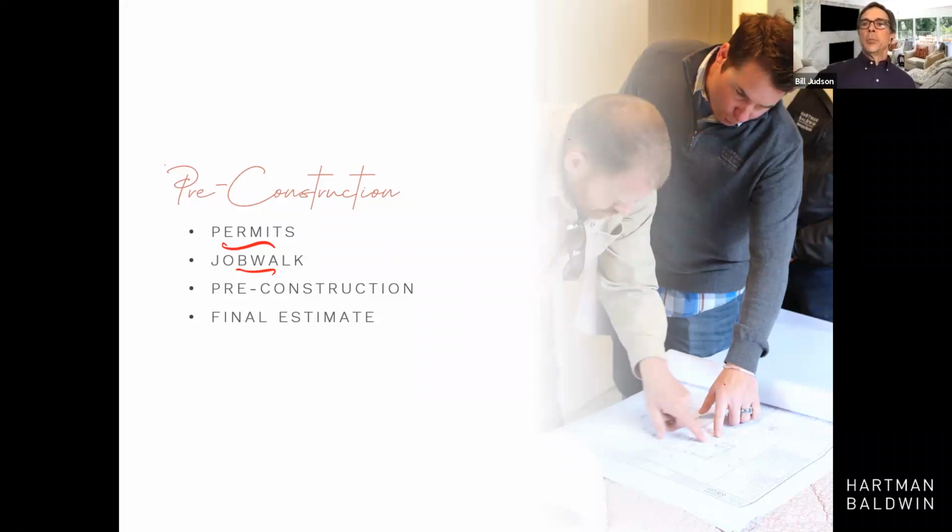We'll also have a pre-construction meeting where we'll sit down and spend some time with you and say, okay, we're ready to start construction. Here's when we'd like to start. How are we going to be living together here? Where are you guys going to be? What time can we start? What time would you like us to finish? We're going to set up a temporary kitchen. Where can we put that? Make sure that you're comfortable with everything that's going to happen before we come and start demoing anything.